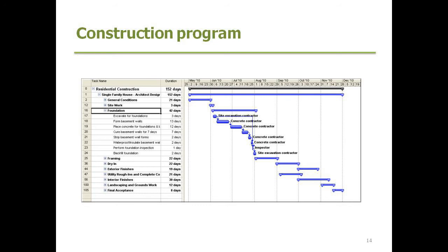Keeping the headings of these in line with some of your costing headings and also contractors is very useful. But this is a very important document for managing your trades, managing deliveries, managing your cash flow as well, and also indicating what that final practical completion date is and whether there's any movement likely to impact on that.